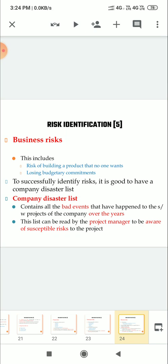To successfully identify risk, it is good to have a company disaster list. What is company disaster list? It contains all the bad events that have happened to the projects of the company over the years. This list can be read by a project manager to be aware of susceptible risk to the project.